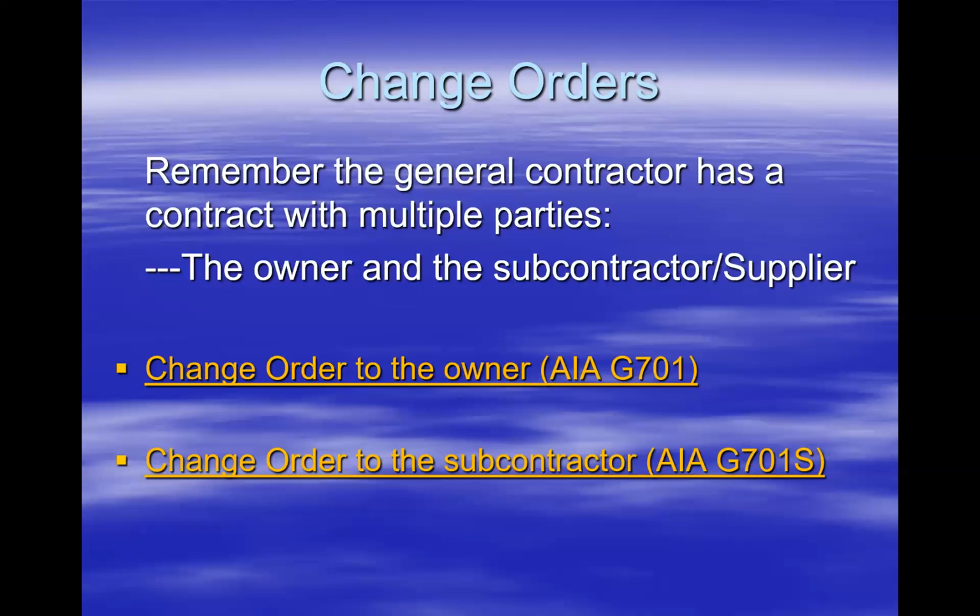So you could take one change order to a prime contract, and as we start looking through and seeing how it would affect our subcontracts, we could have one change order to the prime contract that could make 5, 10, 15 modifications to subcontractors.